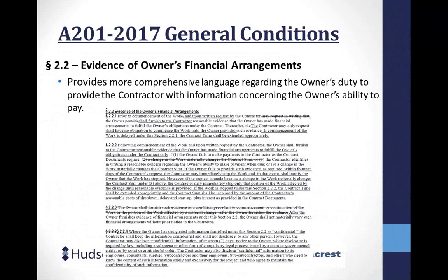I think that's probably the biggest danger, to answer your question. It used to be 80-20 in terms of the amount of financing. Obviously, those percentages have changed in terms of what's required to do these deals, depending on who you're dealing with in the development world. And if there's a substantial equity contribution that's required, you need to make sure it's been made. Otherwise, you have an underfunded project from the jump.